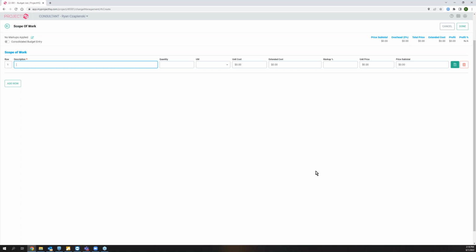So if we think about the change order in terms of a printable form, they would get added. We can add additional line items here. If we have a printable form, the body of the form is what we're populating by adding line items here. And this is where there's flexibility. Some contractors, they type up line items here, and there's one line for labor and how many hours we're adding for this change order. There's another line for material with the total price for material, maybe another line for profit and overhead. There's a bunch of different ways that you can enter this in. There's a lot of flexibility here. We're populating the line items.